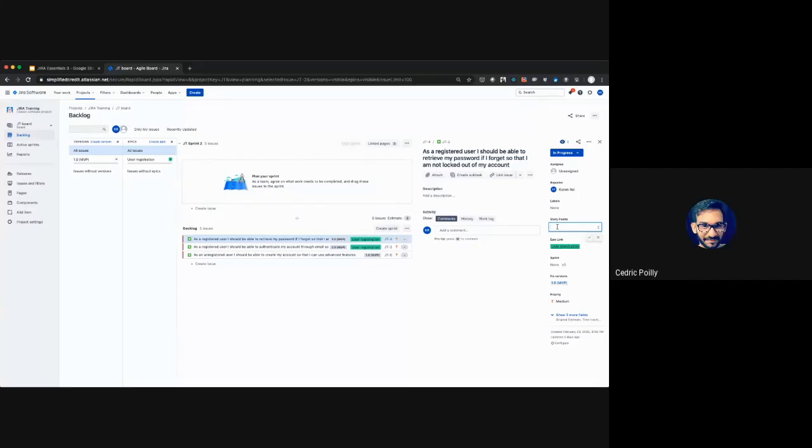So do we assume we do all the development for that, front end, back end, the whole flow? Correct. That's a good question. You should estimate from end to end, from the time that you start working on it to actually delivering it to UAT.